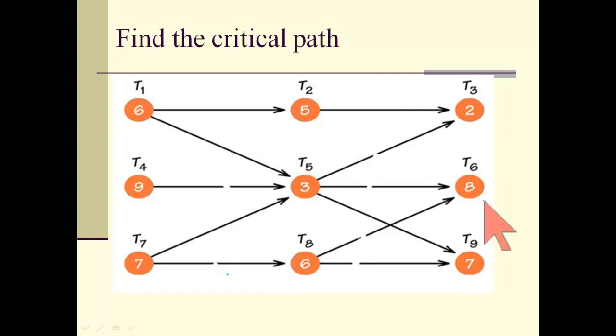So it seems like I would tend to favor using the 9 and the 6 and the 8 if I could, but I can't. I can't get from the 9 to the 6. And so now I'm probably going to have to drop back on one of these a little bit. So to drop back from 9 to 7 or from 6 to 3, the 9 to 7 would be the lesser step. So what about if we choose the 7 and the 6 and the 8? In other words, task 7, task 8, and task 6. That would be of length 13, and 8 is 21.